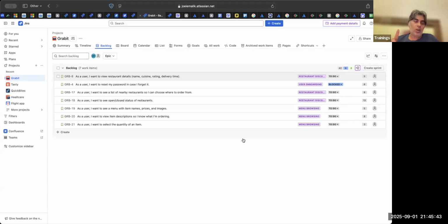I chose the backlog option because I want to move everything back to the backlog and then the PO should reprioritize the work. That is the ideal way of doing it. But some teams will straight away go to the next sprint. That is not a very healthy practice, but some teams do.